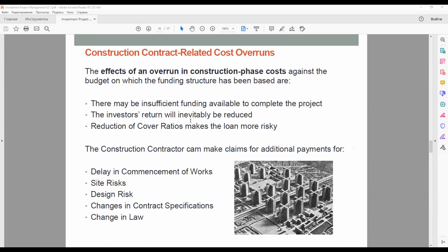The issue here, firstly, is whether the design has been sufficiently completed so that the project costings are not subject to changes required when more detailed design is undertaken. And secondly, is the design unusually complex, which could obviously cause problems during construction? The construction contractor normally carries out detailed design after signature of the construction contract, but this should not lead to changes in the construction contract price.